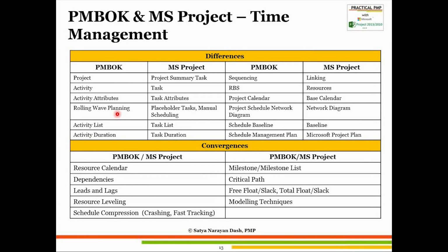MS Project handles rolling wave planning or progressive elaboration using placeholder tasks and manual scheduling. Manual scheduling was introduced for the first time in Microsoft Project 2010. Then there is the activity list, which is an output of define activities in time management.